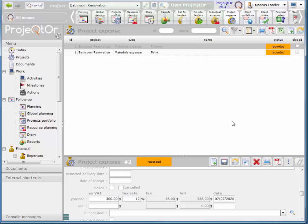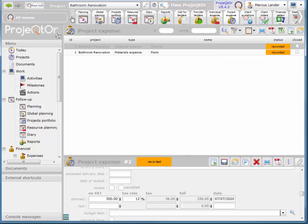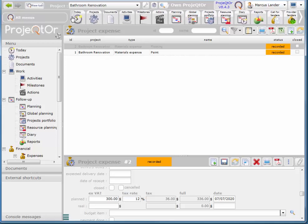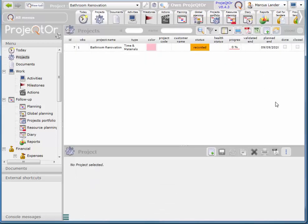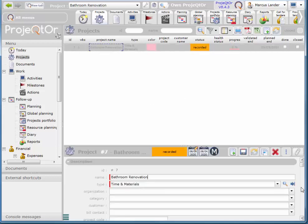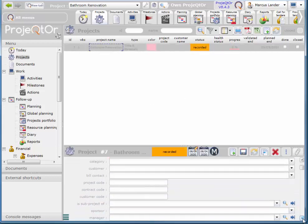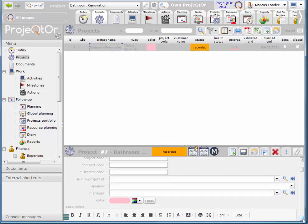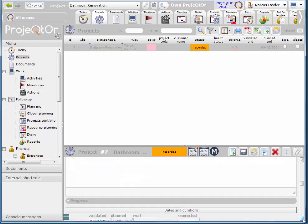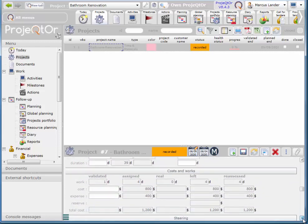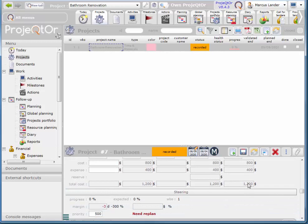So now, if I go back to my project, and I scroll down to cost and works, you see this project is now going to cost $1200. So once you add all of your resources, including their costs, you allocate them to the projects, you allocate them to the tasks, and then you'll know what the project will cost.